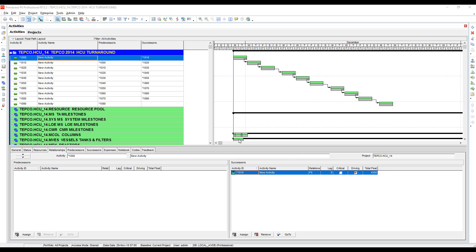First, let's just review some of the general methods you can use for deleting single relationships. You can always go to an activity and go to either the relationships tab, the predecessors, or the successors tabs and click the remove button. That's if you want to do one by one.